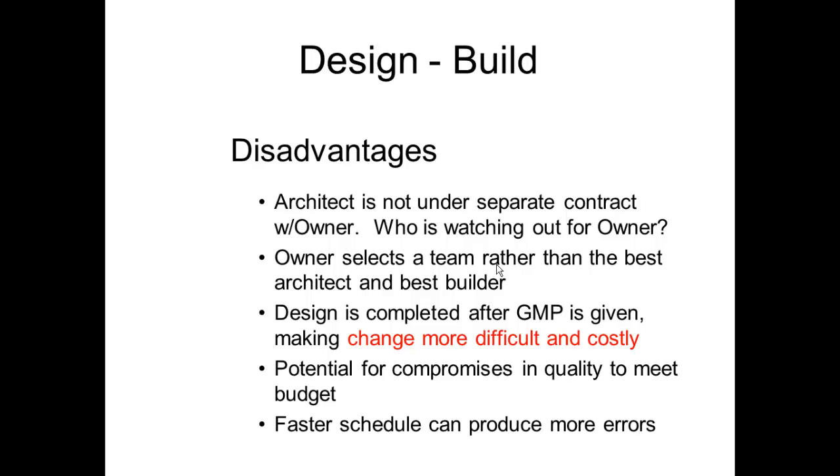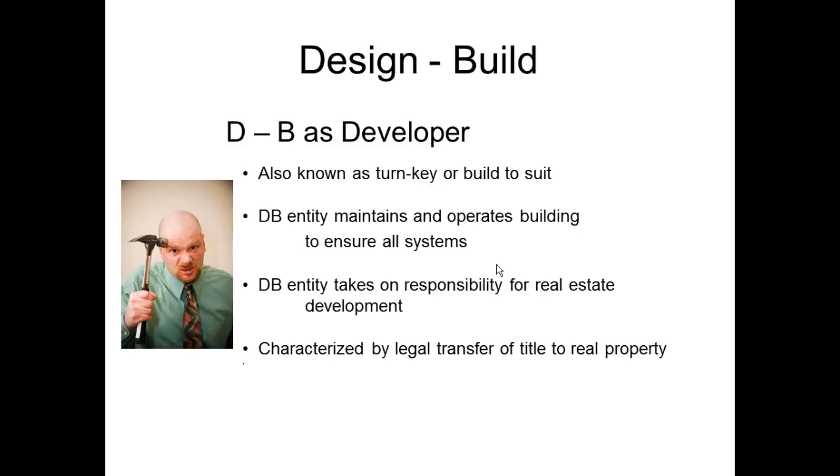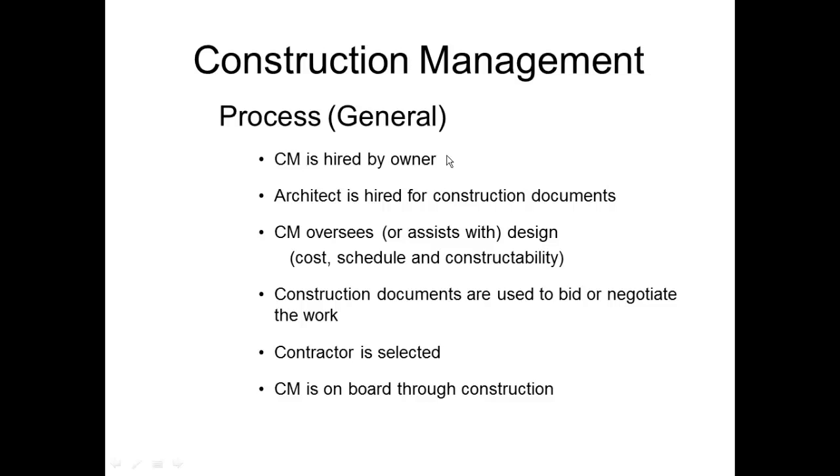There is also design build as a developer or a turnkey, where the design builder actually maintains ownership of the structure and basically leases it back out to the owner. I think we've seen this a few times where a builder will come in, build something, and take care of the maintenance and the operation of the building, the real estate development, all that stuff. So it becomes a little bit more complicated as to ownership rights, and we don't see it very often.